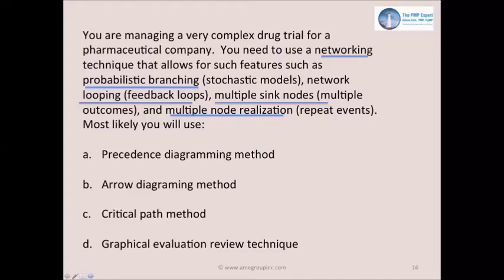Multiple sync nodes means there's different ways the network diagram might end. An example, the drug trial might fail, and that would be the end of the network diagram, or it might succeed, and then repeat events. Most of these are not common terms.